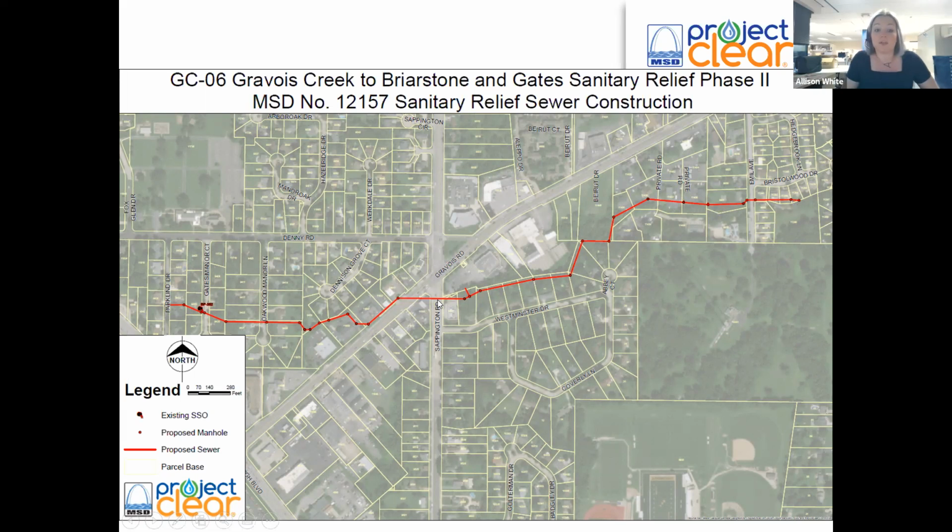Things that should be noted are that crossing there at Sappington and Gravelway, we'll talk through our construction means and methods, but it will be a pipe and tunnel construction. So it'll actually be occurring underground. So it's less impactful to the surrounding community, and you'll still be able to utilize that very busy intersection. And there's another portion of this alignment that will be constructed in that pipe and tunnel fashion as well.